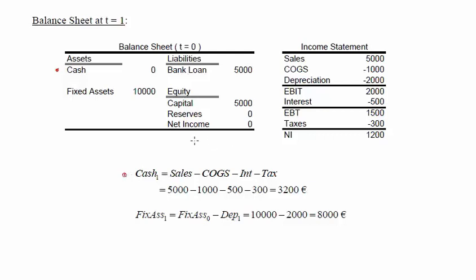What is important in this calculation is to notice that depreciation does not involve cash. It's just an accounting number. It's here because in fact the tax authorities allow us to consider it here, and the effect is essentially reducing this amount here, the earnings before taxes, because you are subtracting this from the sales. So the earnings before taxes is lower, so the tax is lower, and of course the net income is also lower, but there is no cash involved.